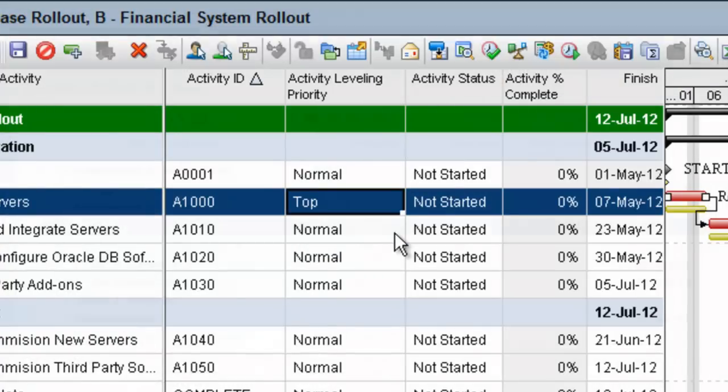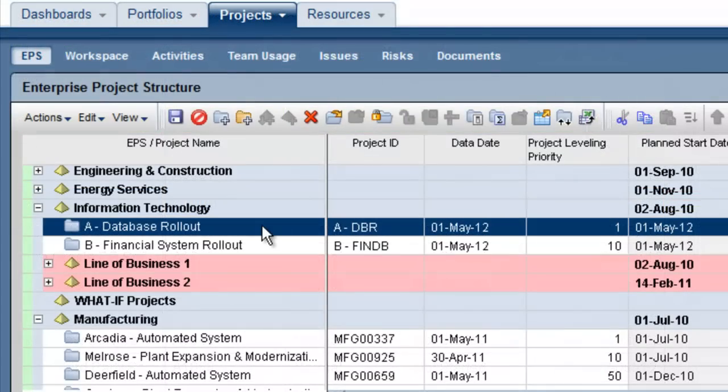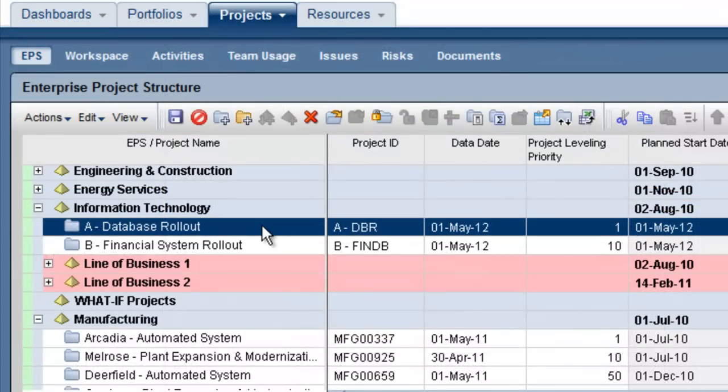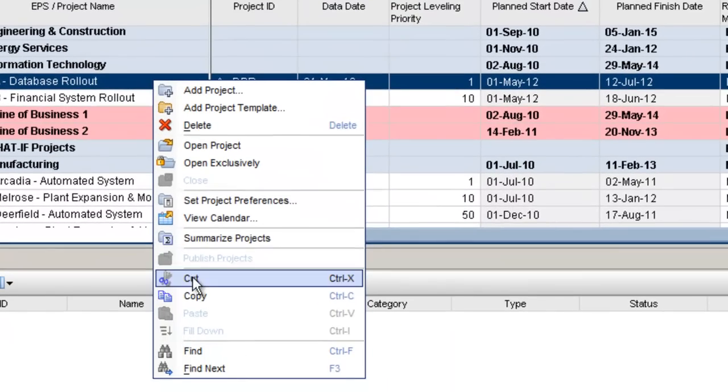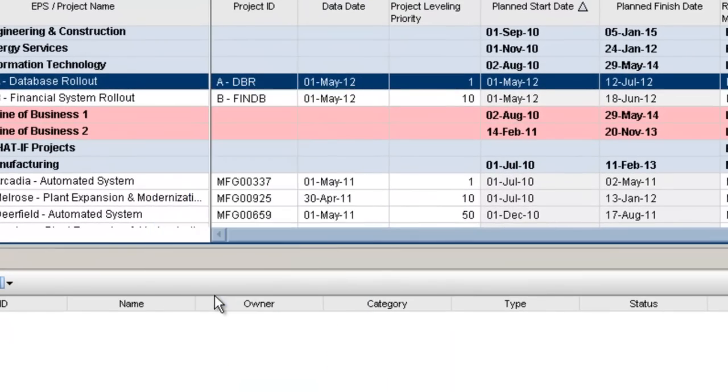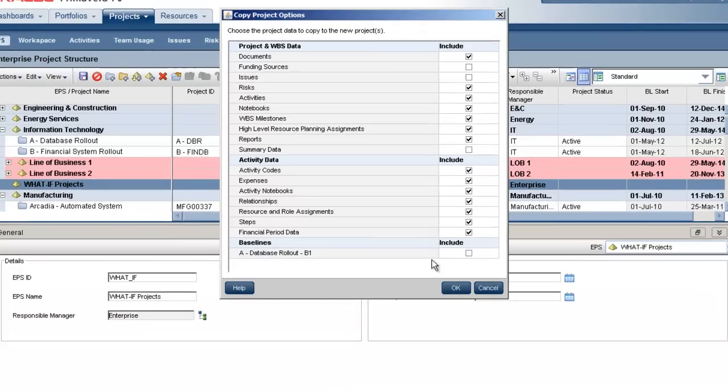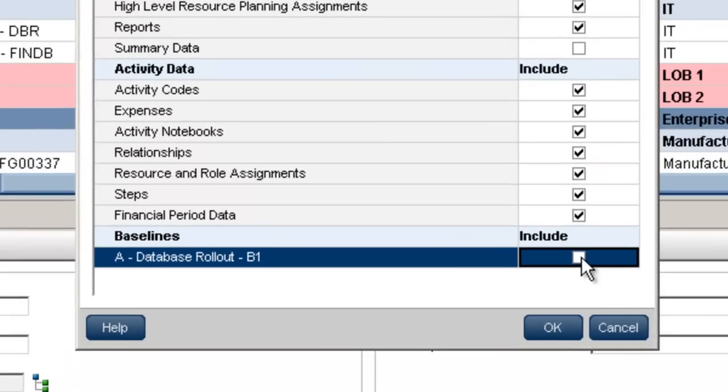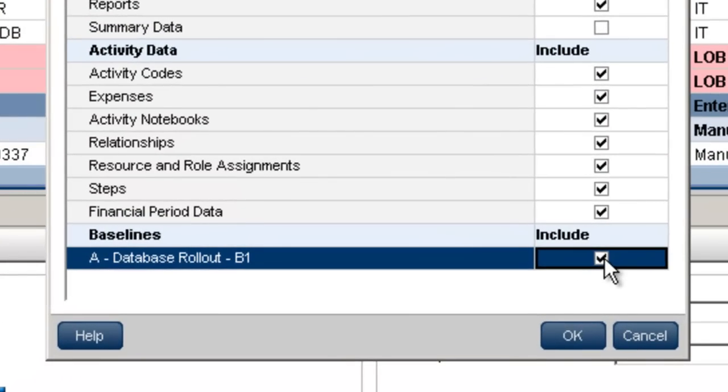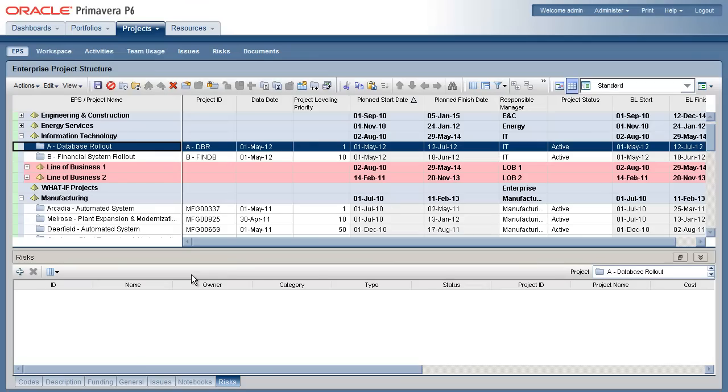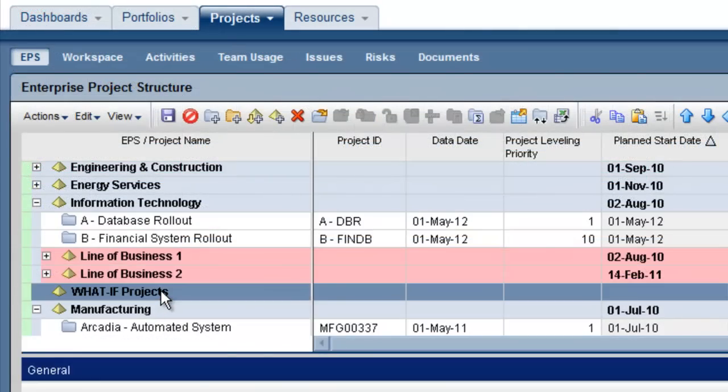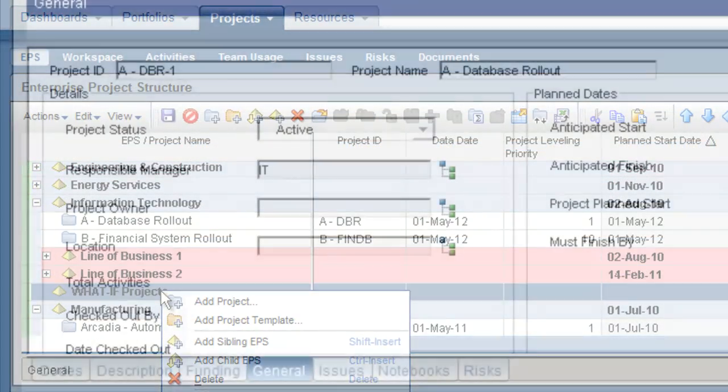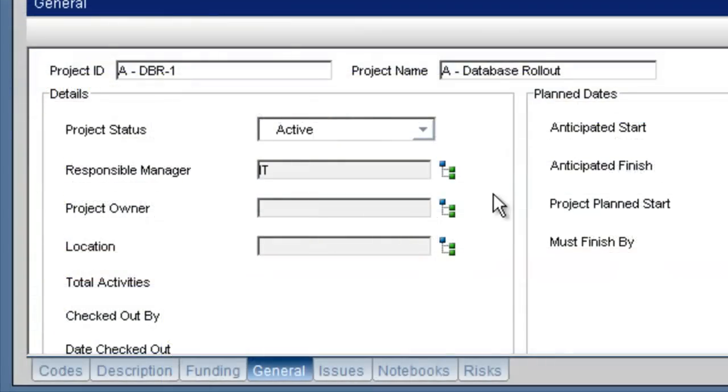We'll now go to the EPS page and create a copy of these projects, including their baselines, ready for what-if resource leveling. The copies have been placed in a what-if EPS node and their project status value set to what-if.